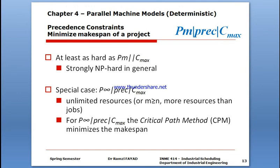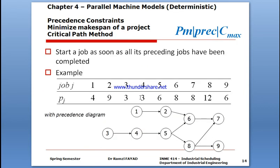In this video we're going to show how to minimize the makespan of a project. If you have several machines with precedence constraints and parallel machines, make sure there is a flow. Makespan is the time when the last job would finish. The job scheduling could be a flexible flow shop with more than one machine at every stage. We'll use the critical path method to minimize the makespan.